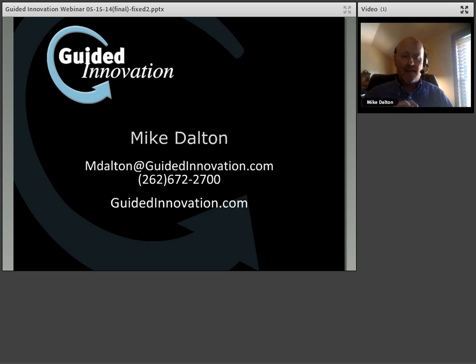The key thing in relay racer behavior is that it doesn't mean people can't work on multiple projects. It means that they're only working on one task at a time. And what's important there, and I didn't really mention it, but it's probably worth mentioning, is tasks are not months long. Tasks should be a couple of days, maybe a day to 3 days, maybe 5 days at the most. If you model tasks that are a month long, they really are milestones.